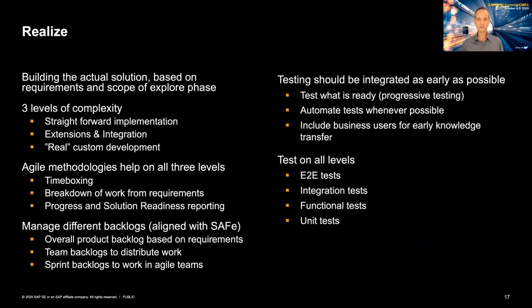And last but not least, there are tests on multiple levels. So if you do development, so the largest complexity level, then unit tests are important and need to be done during the development process. Functional tests also need to be done in sync with the sprints or waves or releases that you do to make sure that the functionality works from a business perspective and fulfills the requirement. Then you have integration tests. And these integration tests are necessary in order to make sure that all the connected solutions work. And at the end, E2E tests that the complete business process works.